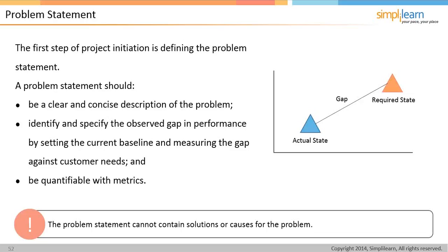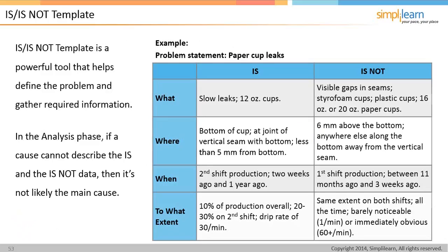So the moral of that story is that just because you start with your objective statement, or at least you think it's objective, doesn't mean it's written in stone. You might think you need to improve from 80 to 90%, without harming the performance of that element of the process. You put that in there as well, but those numbers are subject to change as you gain a better understanding of the process. As you go through it and do your MSA, or measurement systems analysis, you validate or find the correct numbers, so they could change. But it's important at least to start with where we think we are today. That's your current baseline. We think we need to get to there, and the gap, or the difference, is what we need to close.